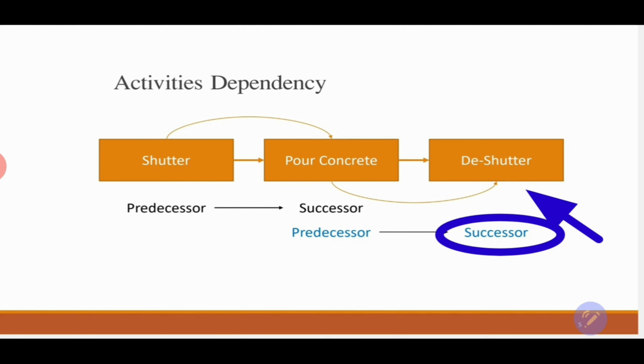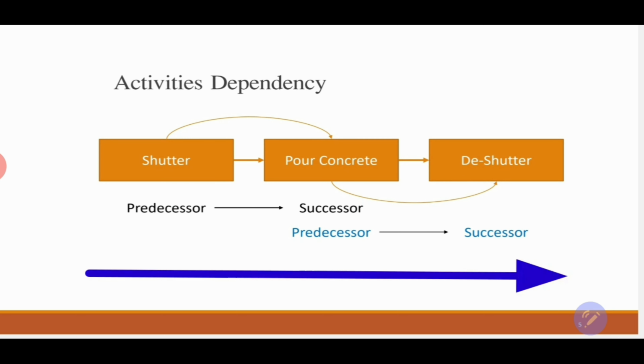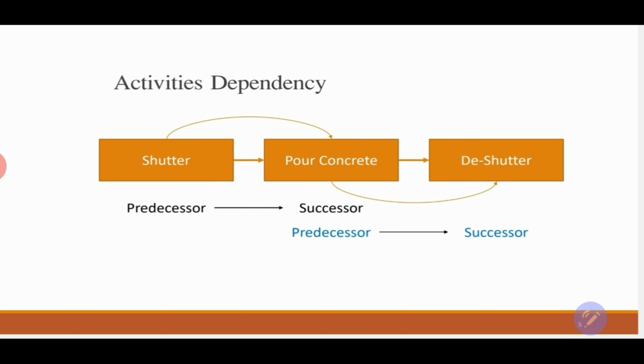Why are we presenting these activities in this manner? Because the 3 activities have a dependency on each other. The shattering to start is dependent on completing the concrete, and pouring the concrete to start is depending on the shattering to be completed.